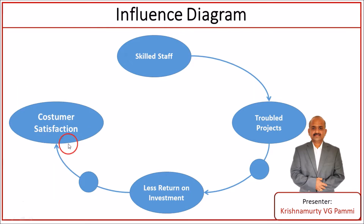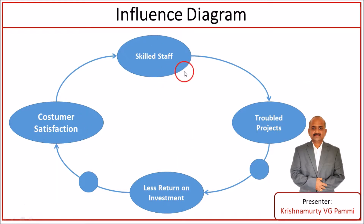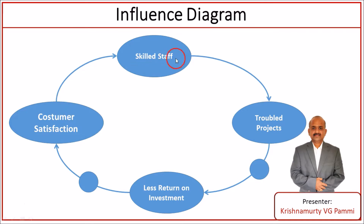The moment you see less or medium customer satisfaction, you tend to arrive at a conclusion to assign skilled staff on such projects. So it is like a circle — skilled staff leading to troubled projects, leading to less return on investment, leading to less or medium customer satisfaction, and again you have skilled staff being assigned to troubled projects. The circle goes on.